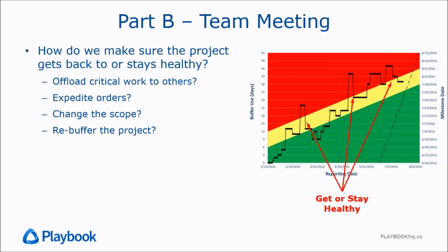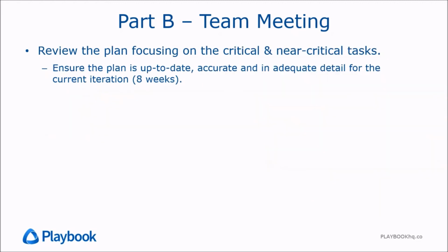Like maybe the business has added more scope to the project, and that gives you an opportunity to identify the additional work that needs to be done and roughly how long it'll take, and consequently you'll be allotted more time. You'll be able to increase the size of the buffer. But otherwise, we won't just be able to go change the size of the buffer. That's not the right answer.